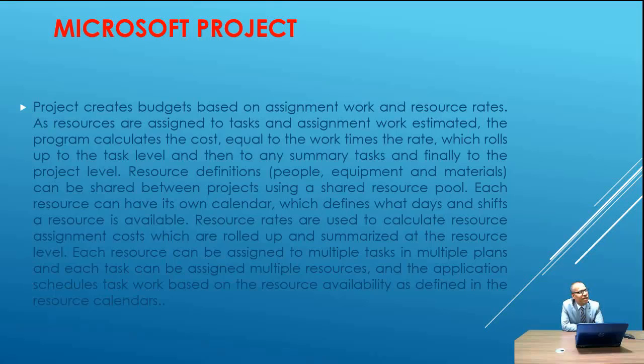عندنا من الامور المهمة اللي يتعلمها الطالب هو استخدام السوفت وير في إدارة المشاريع. من هاي السوفت وير هو مايكروسوفت بروجكت. A project creates a budget based on assignment work and resource rates. As resources are assigned to tasks and assignment work is estimated, the program calculates the cost equal to the work times the rates, which rolls up to the task level and then to any summary tasks and finally the project level.